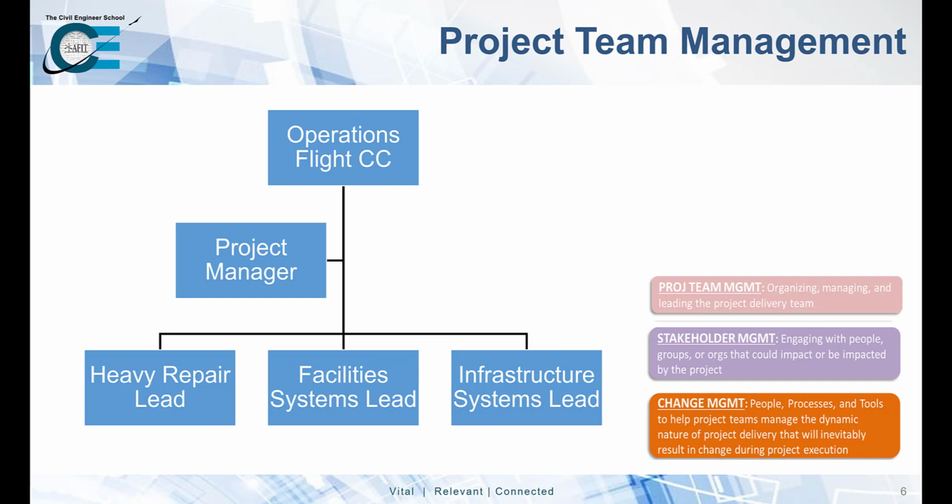AFCEC's Project Execution Playbook highlights the importance of having a project management plan at the outset of project design. They note that the project manager should sketch a project team organization chart and set the rules to be followed for communication. The plan should include information about who calls whom, who gets copied on information, how many copies of which A&E submittals go to whom, and so on and so forth.